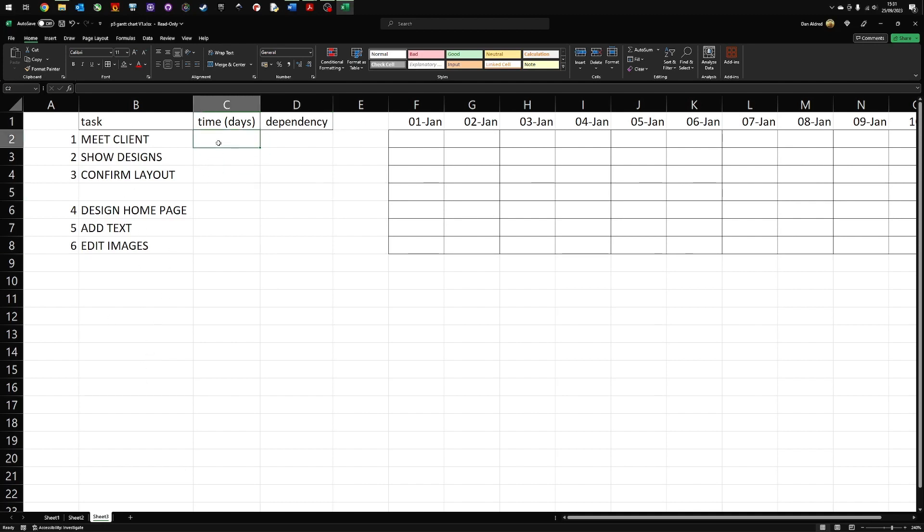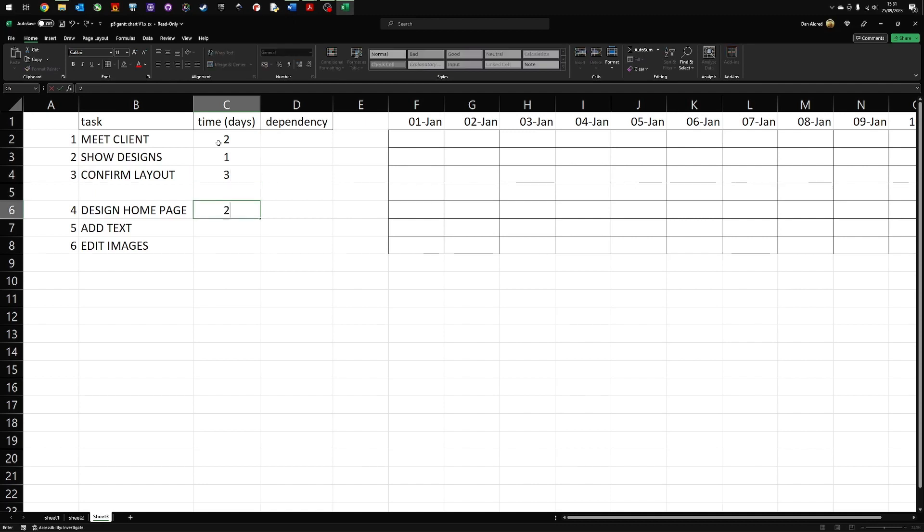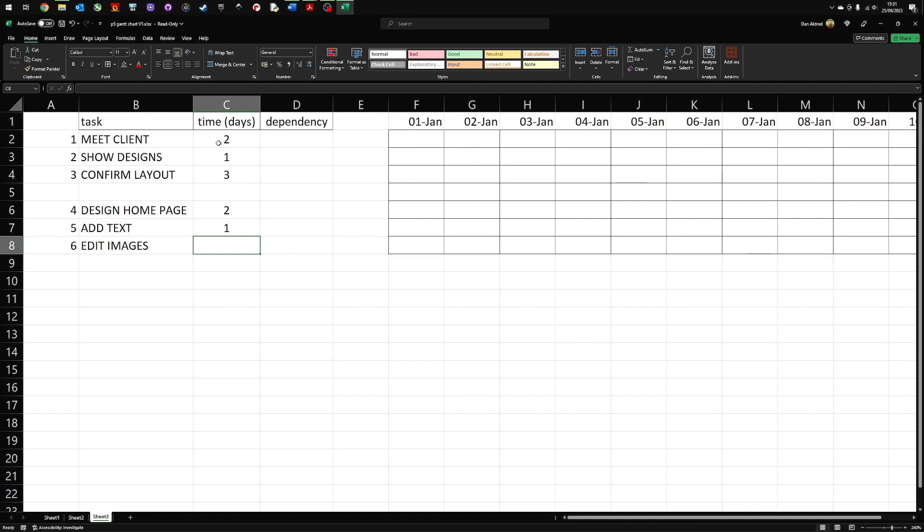So the first thing I do is I decide how long roughly I'm going to need to complete the task. So I'm going to give the client two days to meet. I'm going to show them designs, which will probably take a day. I'm going to give them three days to confirm the layout of the project. I'm then going to design the homepage, which is going to take me two days. I'm going to add the text, which is going to take me another day. And I'm going to edit the photos and images to go on the homepage. This will take me another two days. So far, so good.